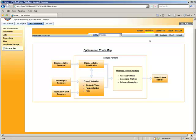First, we look at the business drivers and try to prioritize them. This is called business driver prioritization, and we do this via a pairwise comparison chart. Next, we'll go through and see how projects compare to the same strategic values, and decide which are the most important projects and which are the least important projects. So let's get started.